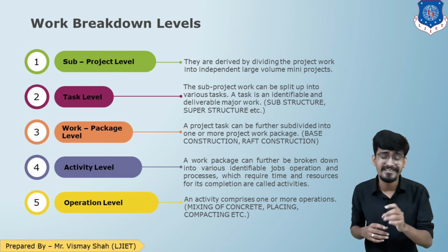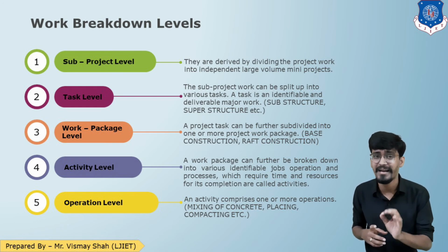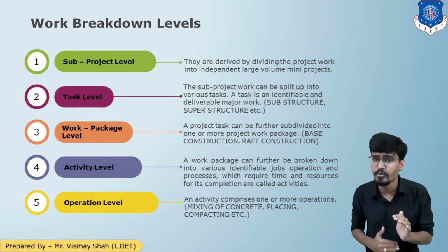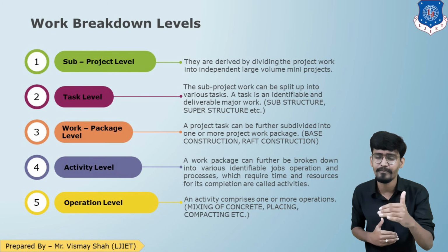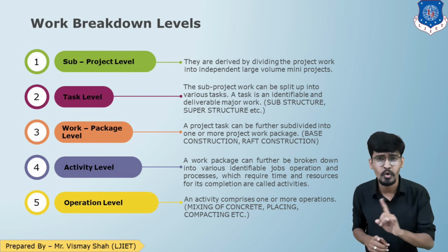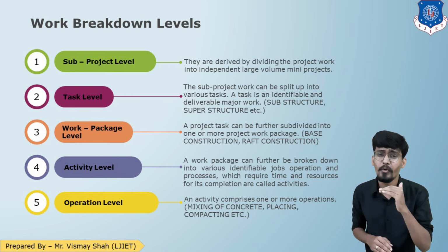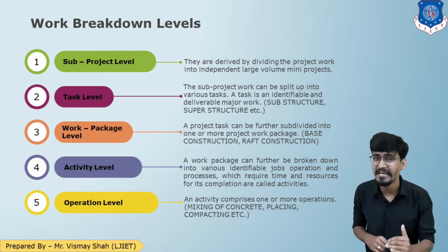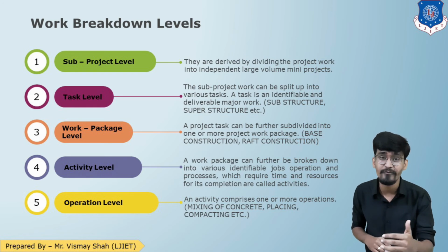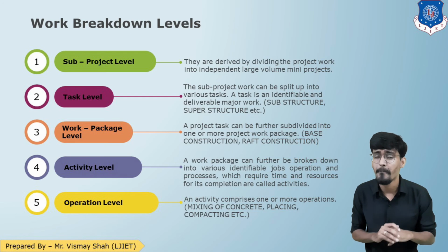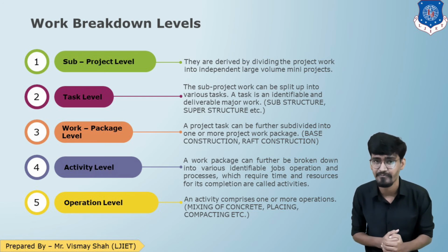Students, the point to be noted here is that it is not necessary to divide every project this way, that you first divide into sub project, then go for a task, then go for work package. No, it is not compulsory. You can directly divide a project from sub project to activity, or directly start from the work package and then activity. So it is not compulsory to follow all the 5 levels every time.